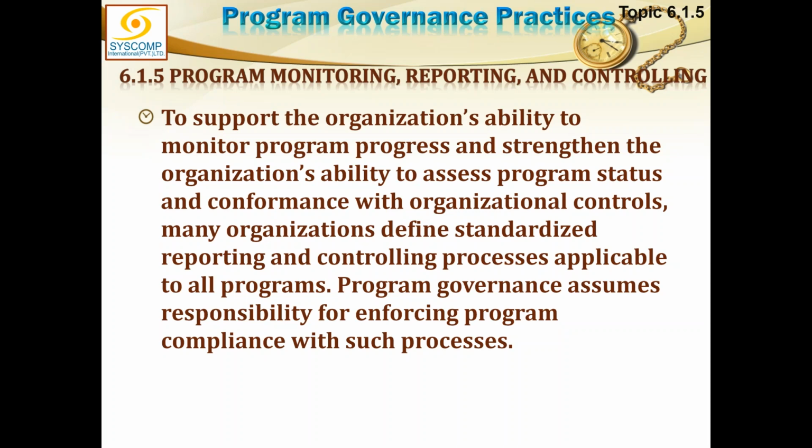So program status and conformance with the organization controls. Many organizations define standardized reporting and controlling processes. So if you have a mature organization, they have been running projects and programs for many years. So they will have their standardized reporting and controlling processes applicable to all programs. So there will be a standardized mechanism for that. So program governance assumes responsibility for enforcing program compliance with such processes.